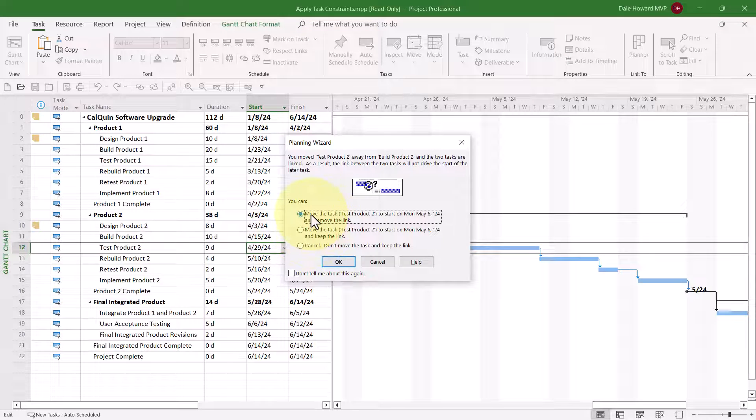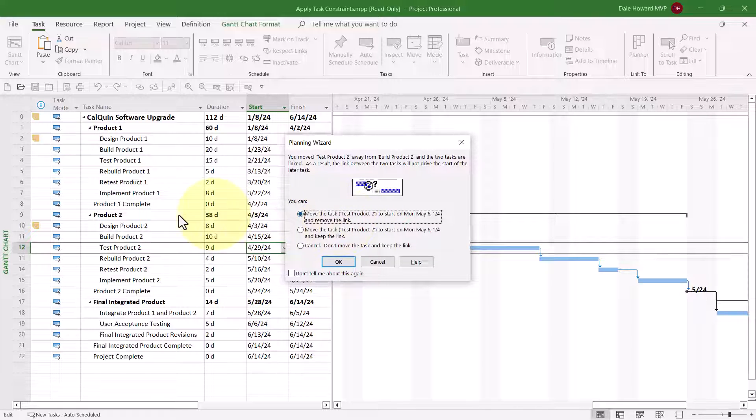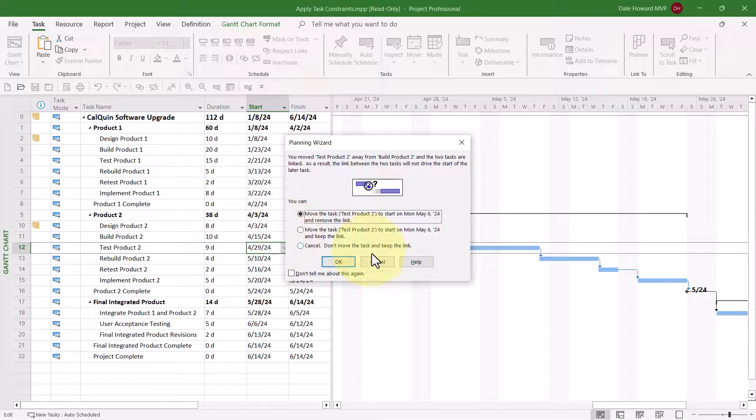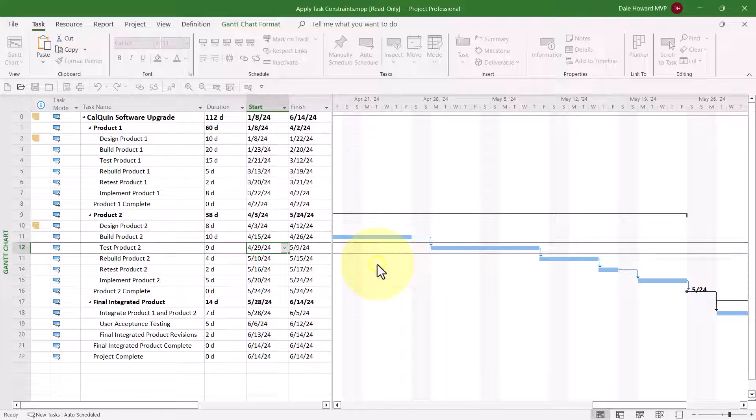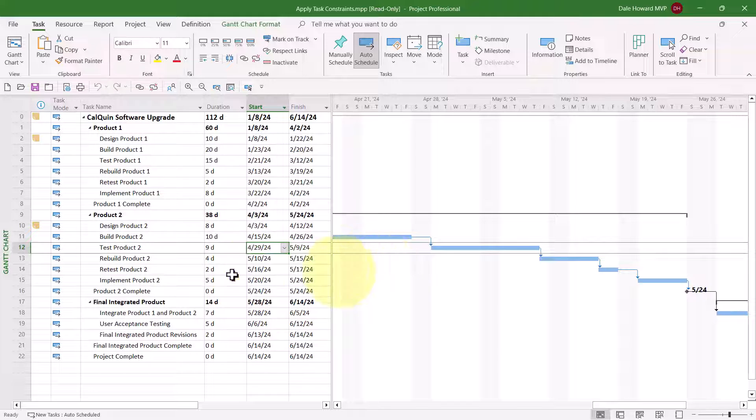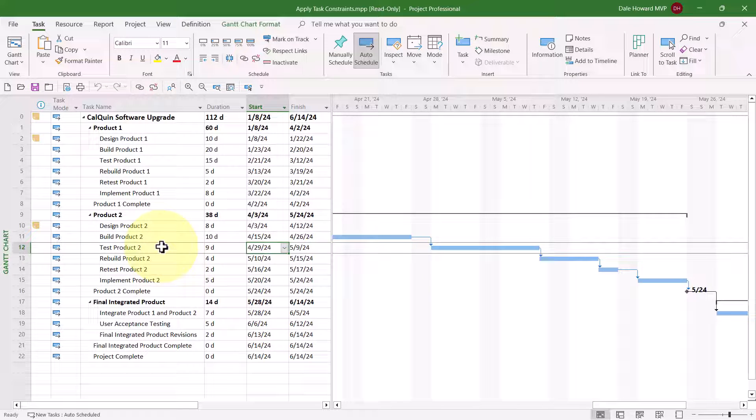Worse still, the default option in this dialog, move the task and remove the link, that's the wrong option. That's not what we want to do. So I'll go ahead and cancel, and let me show you instead the correct way to set a constraint so that you keep control of the process, not Microsoft Project.